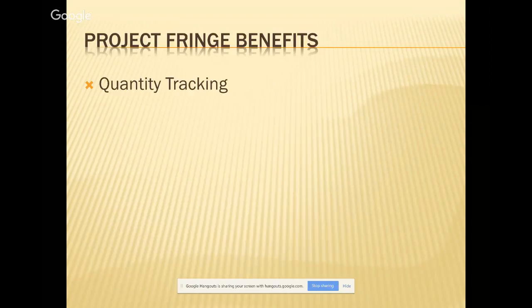So how do I use this to make sure that my project health is being tracked? Well, here's a quick glimpse. Say that we're halfway through a project. It's halfway mark via schedule, and it looks like the project's about halfway done. And I want to look at my concrete budget, and I want to look at my concrete takeoff. So from Rubber Stamp, I will know how many cubic meters of concrete I've poured to date as of that very morning. But I'll also know how I'm doing on the concrete cost code budget. So if I've poured half the concrete and that's tracking okay, but I've already spent 60% of the budget, then I know that I'm tracking to go over. And I know that early on.